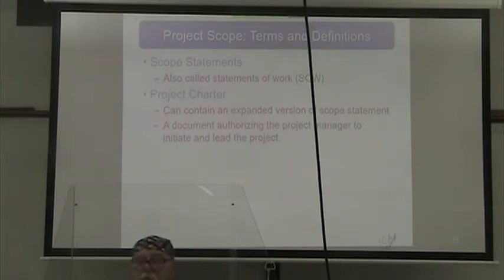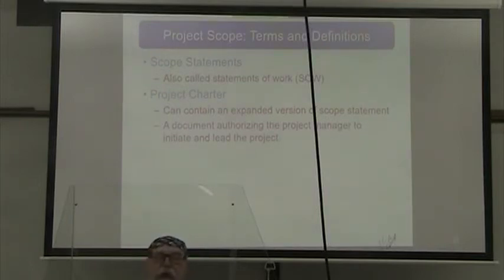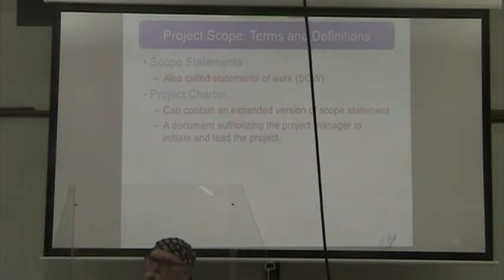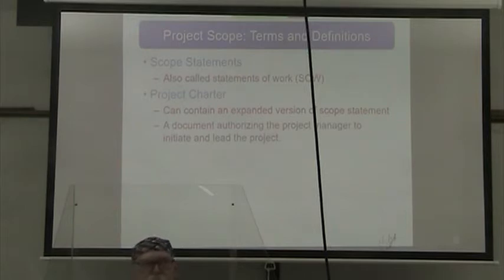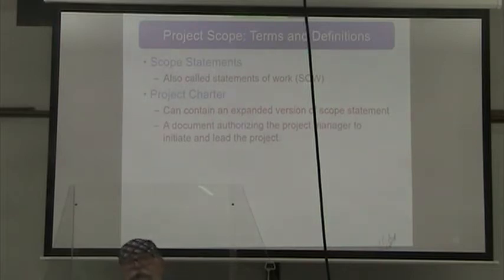A lot of times we'll do a project charter, which tends to be a larger version of the scope statement. In the scope statement for our vaccine project, we might say 'keeping with all applicable medical standards.' But in the charter, we expand that out — we will have doctors overseeing this, proper facilities for preserving the vaccines, and proper medical personnel to administer them. We often think of the charter as authorizing the project manager to go ahead and lead the project.